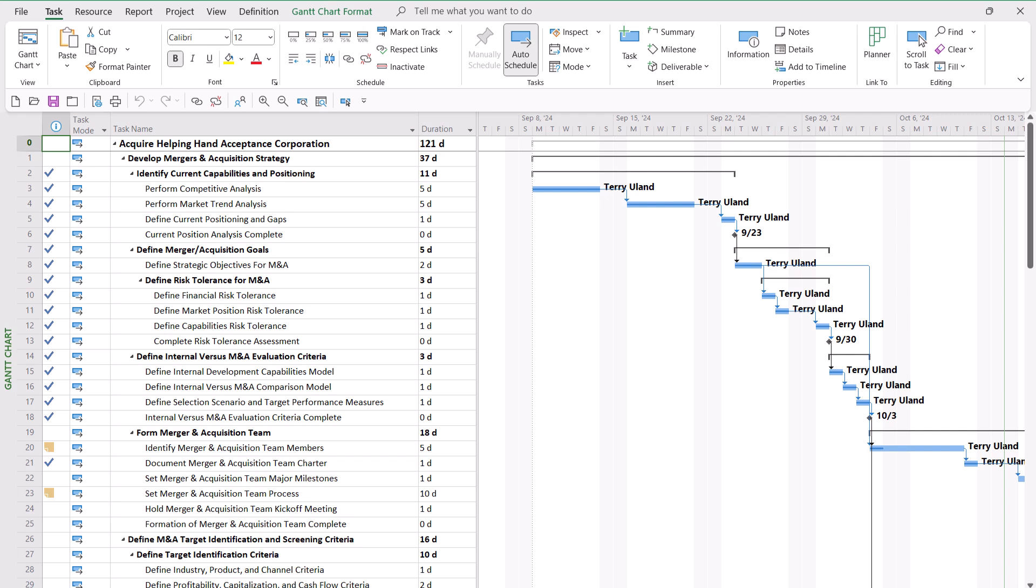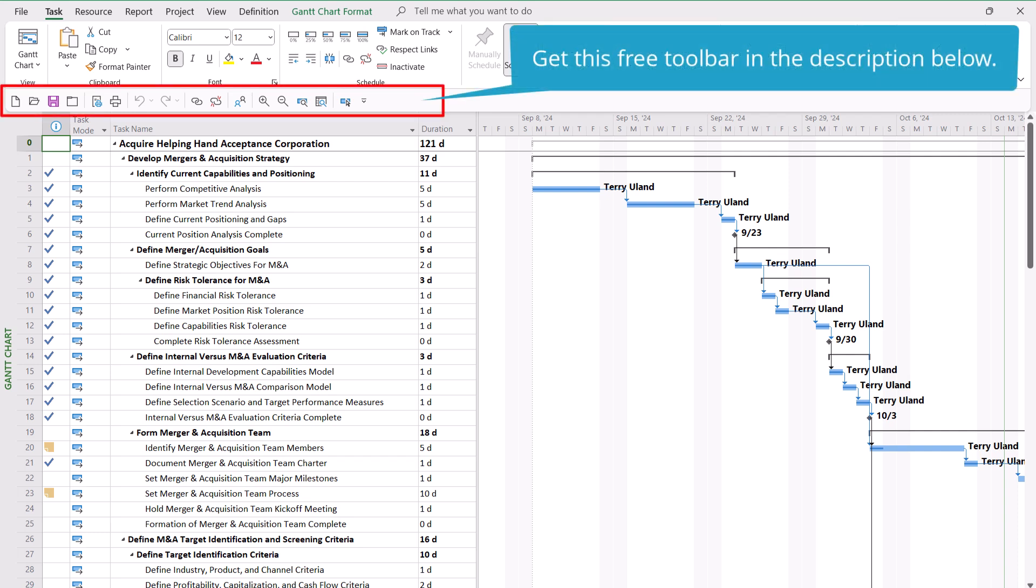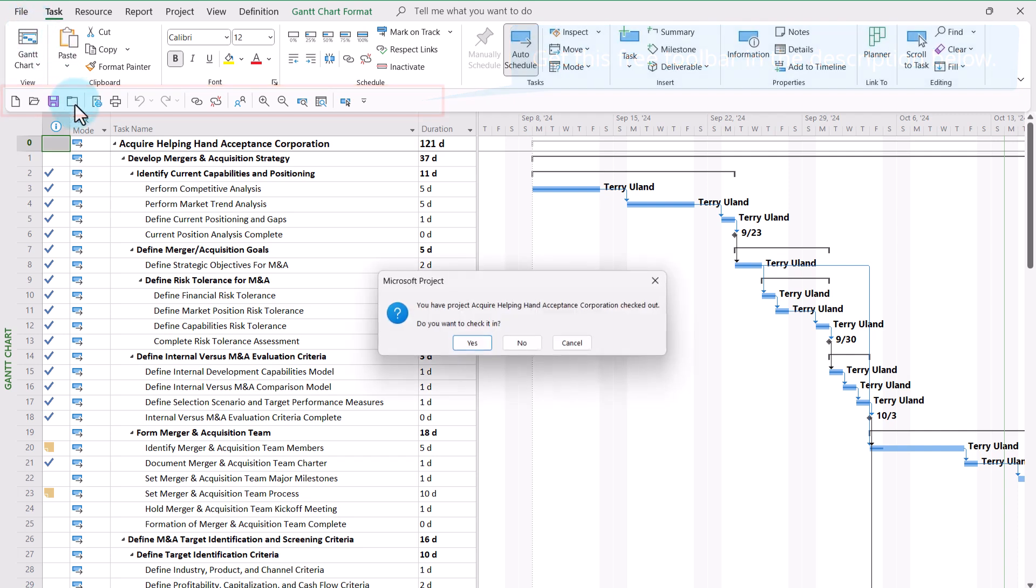So while I'm still here in our corporate office and connected to our corporate network, I need to open and check out the project for editing. Then immediately, I need to close this enterprise project.